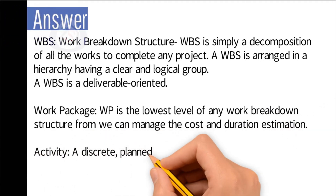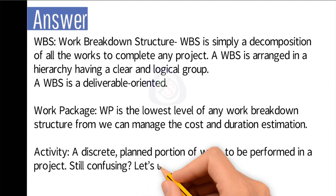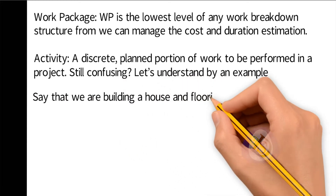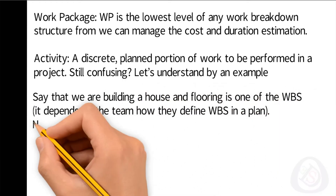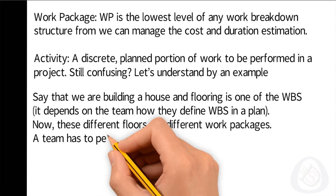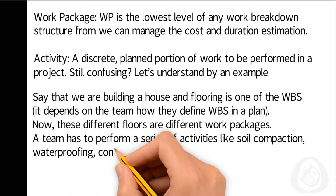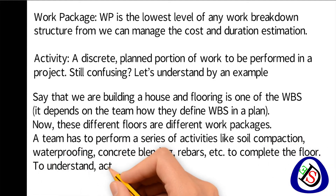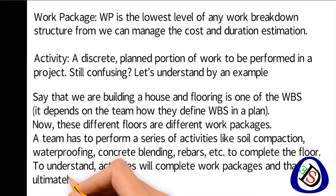Activity: a discrete planned portion of work to be performed in a project. To understand by example: say we are building a house and 'flooring' is one WBS element. Different floors are different work packages. A team has to perform a series of activities like soil compaction, waterproofing, concrete, blending, rebars, etc., to complete the floor. Activities complete work packages, and work packages ultimately complete the WBS.